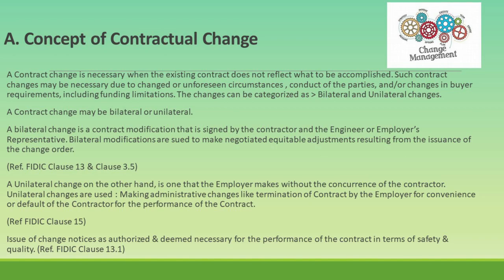FIDIC Clause 3.5 — Determinations — outlines the engineer's duty to consult with both parties to reach an agreement on any determination required under the contract. If an agreement cannot be reached, the engineer must make a fair determination based on the contract and all relevant circumstances. A unilateral change, on the other hand, is one that the employer makes without the contractor's concurrence. FIDIC Clause 15 — Termination by Employer — outlines circumstances under which the employer can terminate the contract, including failure to proceed with due diligence, insolvency, or substantial breaches of contract.